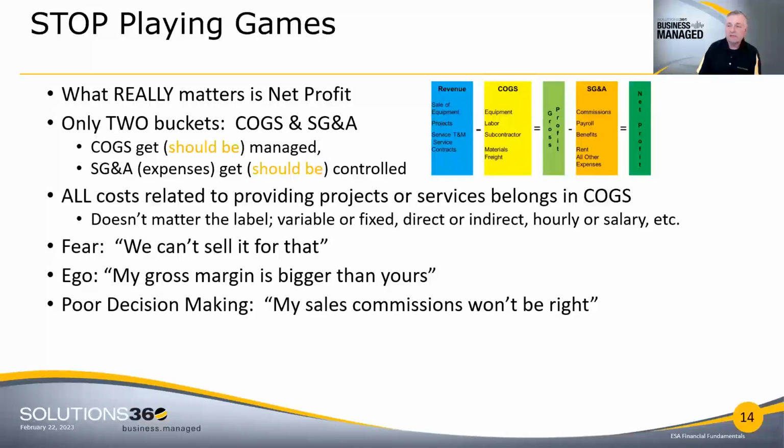And speaking of bad business decisions, sometimes because our commission plans are set based on the gross profit that we generate, we then let our commission plans dictate what we put in or don't put into costs. Again, that is nuts. We should absolutely have accurate costing. And if something needs to change, then we need to change our commission plans to reflect the reality of what our projects cost us. And finally, there's the old, we never did it that way. Well, I would encourage you to not go out of business just because you never did it that way, but instead investigate the costs of it.